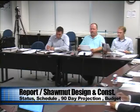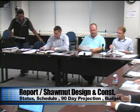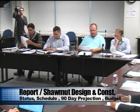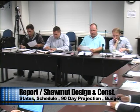So for the project schedule, the project ultimately is tracking on time based on the original GMP schedule. Things are moving along. We track the project on a 3-week schedule, and some of the items on a 3-week schedule are tracking a little bit ahead. Some items might be tracking a week or so behind, but ultimately the project, we feel, is really targeting what we believe to be ultimately going to meet the GMP schedule for the job in its entirety.